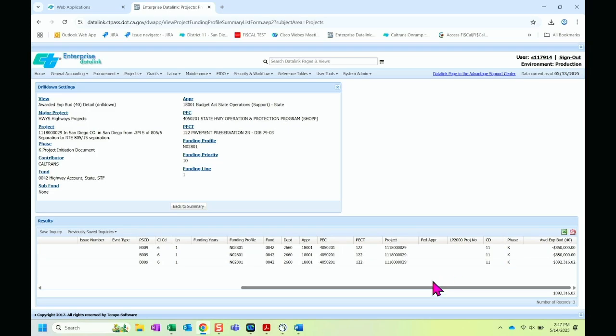So this one, you know how you want to do JVC adjustments on your project and you have to send it up to accounting and they're going to say, give me the details, right? Show me the journal where all these expenditures came from, and you have to attach it a lot of times to the JVC for the adjustments. This report, go back to summary.